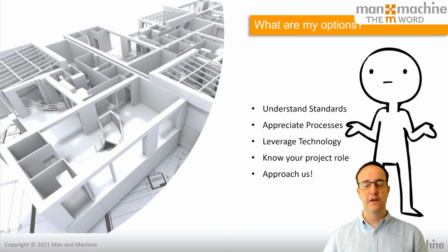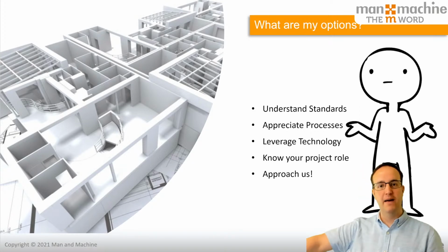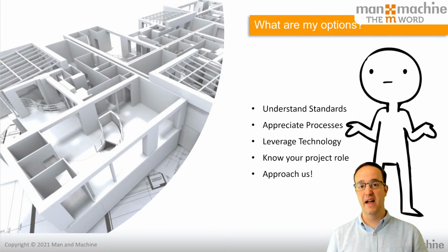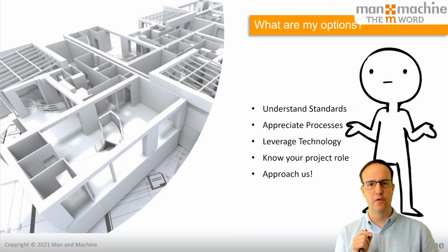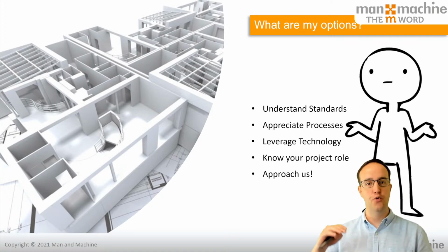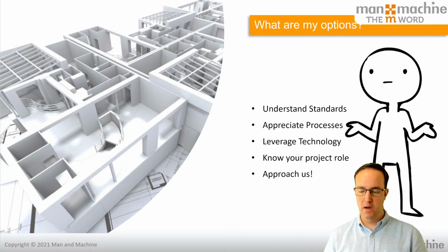in the correct way. If you're just a manufacturer and that's it, I've manufactured the product, here's a BIM model, then you might want to identify and understand 8541 because that will tell you how that BIM model should be and look. You might also want to understand things like ISO 19650 Part 4, which is about the BS 1192 Part 4. ISO 19650 Part 4 will come out later, which will explain COBie and asset information and how you need to align your components to asset requirements on a project. But reach out if you need more information.